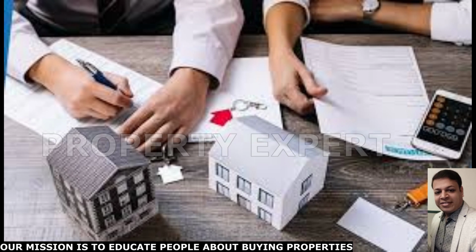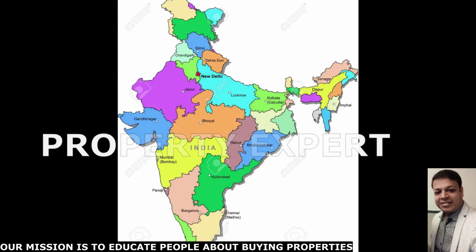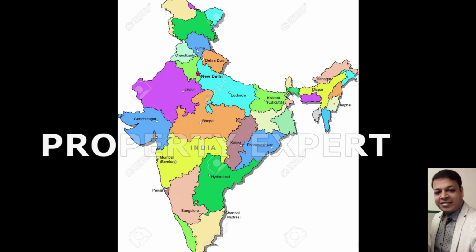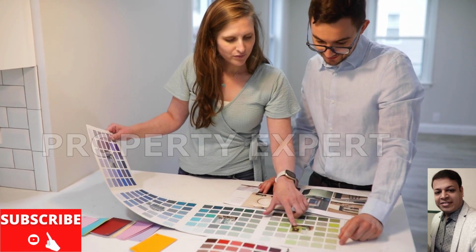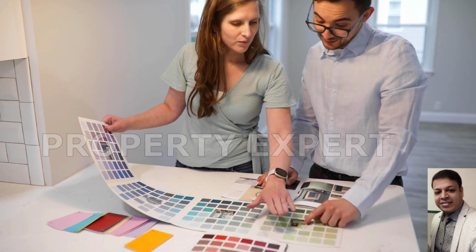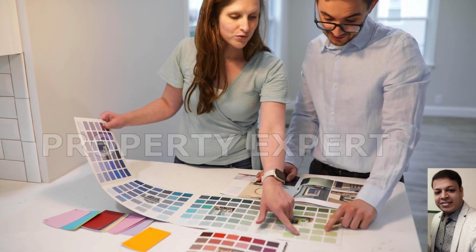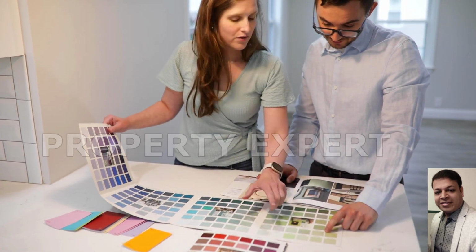Another challenge with regard to states. Almost 20 states have interim or final RERA authority, and each state has some diluted or different version of this act. Another challenge is with regard to the escrow account, wherein 70% of total realization has to be locked in for construction purposes.